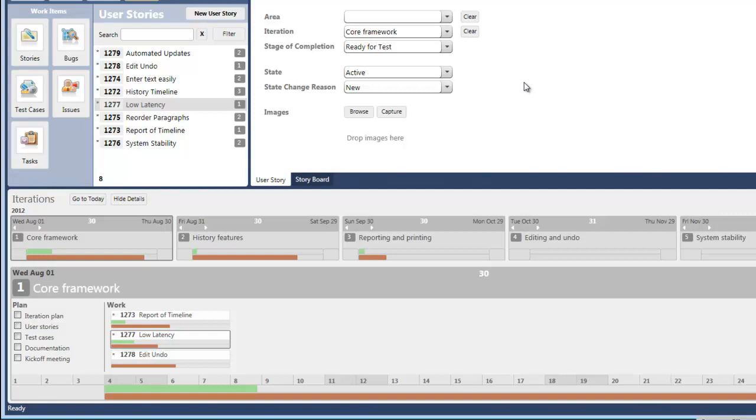Now, one of the interesting things about this is its ability to track your work progress versus today. I'm just going to adjust the system date. So now we're pretending the current day is August 15th. This today bar shows the current day, and it marches along with time. You can't adjust that, but what it shows is that the work completed is lagging behind the current day. So as this day marches along, the goal is to always ensure that the green is up to the current day bar. So if this project was on time, it would look more like this.